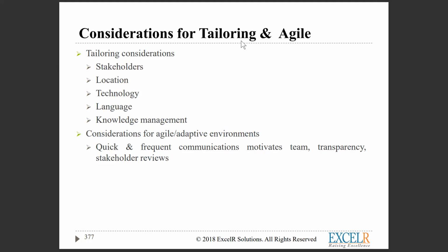If they are still not joining, since we delivered on so and so date and you guys have not turned up, we are marking our milestone as skipped, and for the further due date, whatever the number of days, please approve a change request for the change in schedule of the project. It will have an impact on the cost.